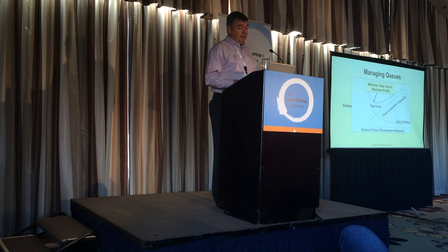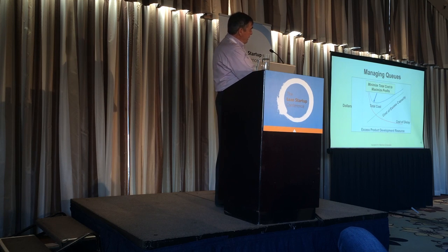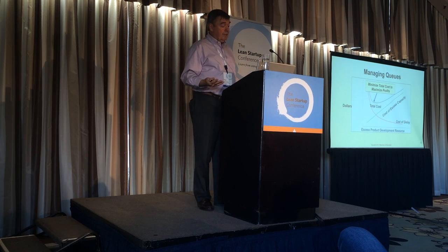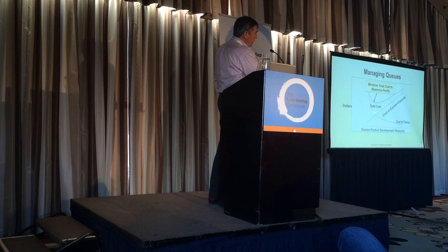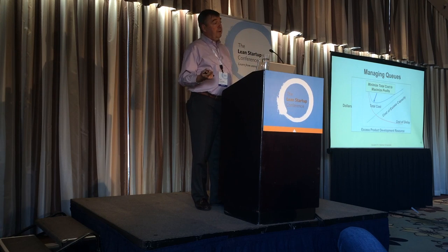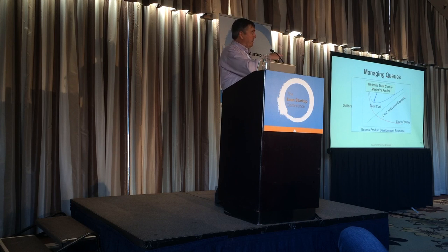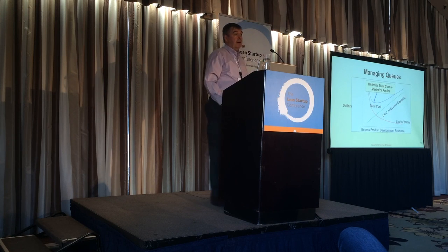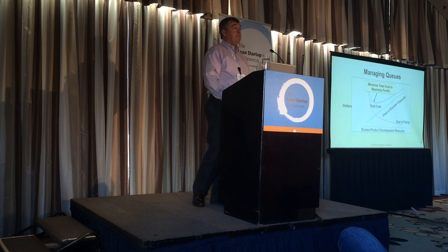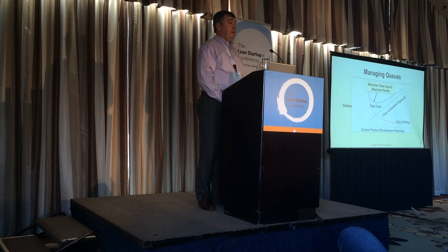But the interesting thing is, if we know what cost of delay is, we can look at this problem and say, look, the less excess capacity in the system I have, the more efficient I am at using the capacity. The cost of excess capacity is low, but the queue becomes larger and larger. And when the queue is on the critical path, it costs me the cost of delay. So I should never increase the loading on the system to the point where the efficiency savings I'm getting on this green line end up being smaller than the rise in cost on the red line.